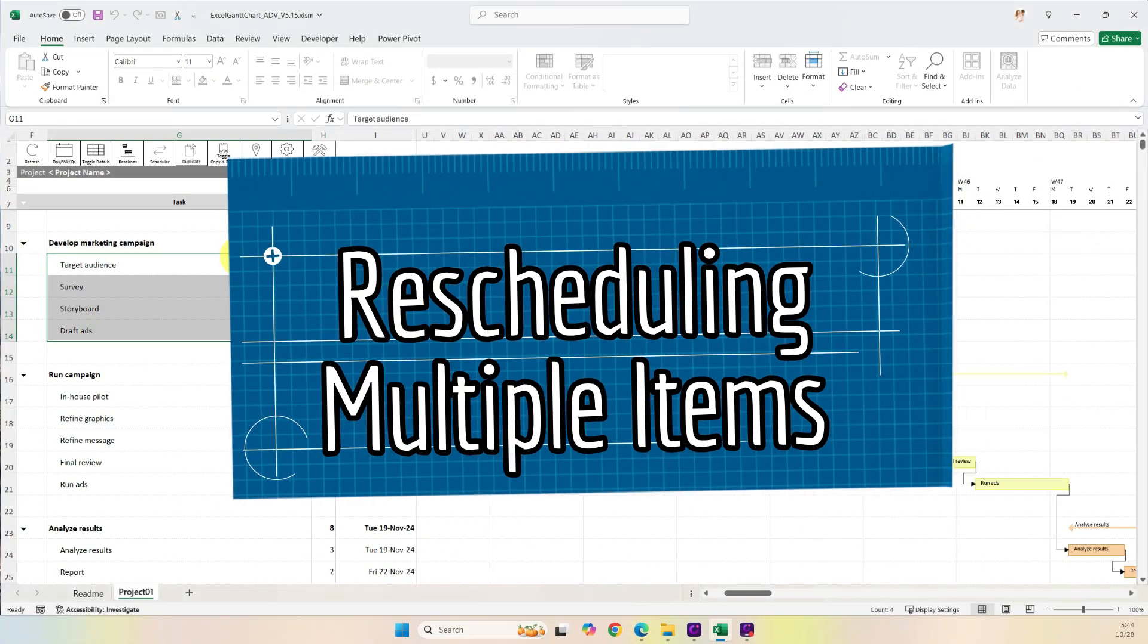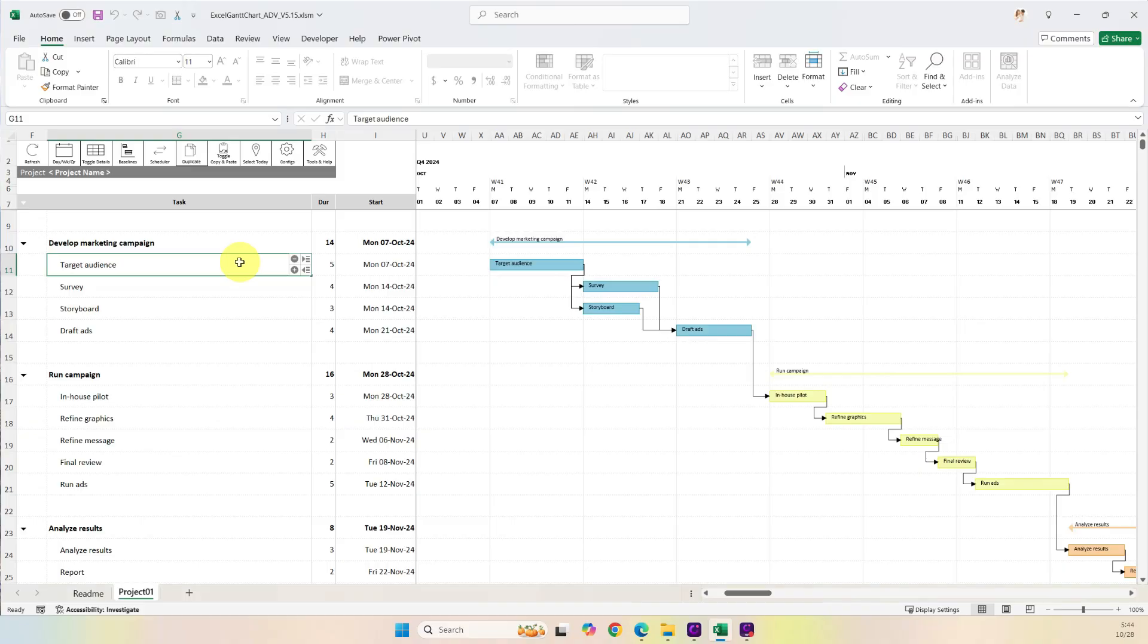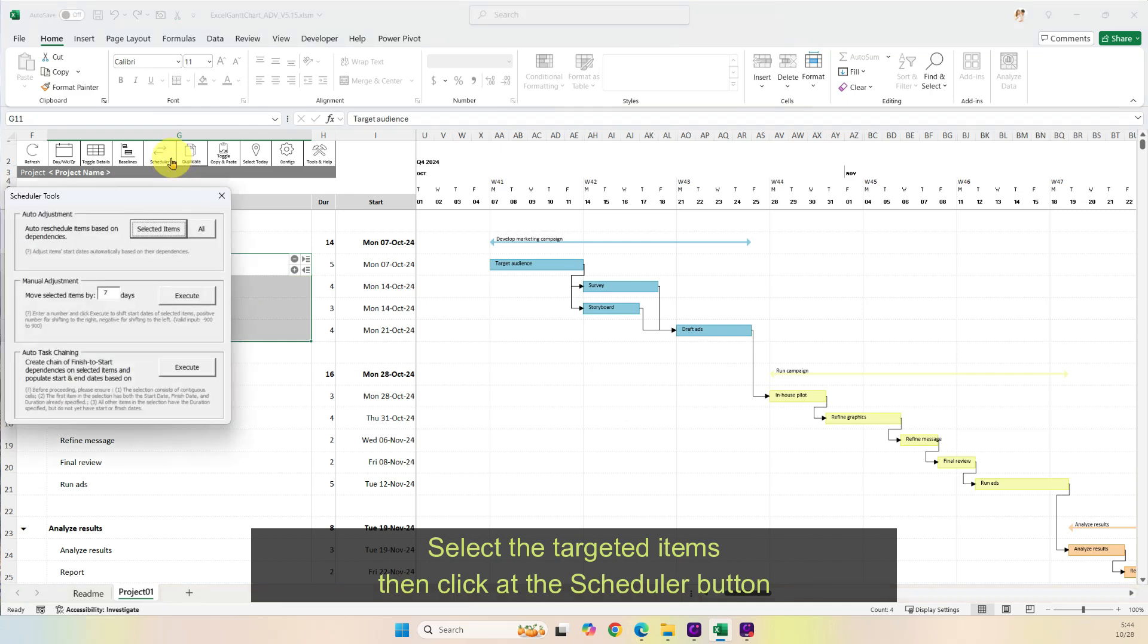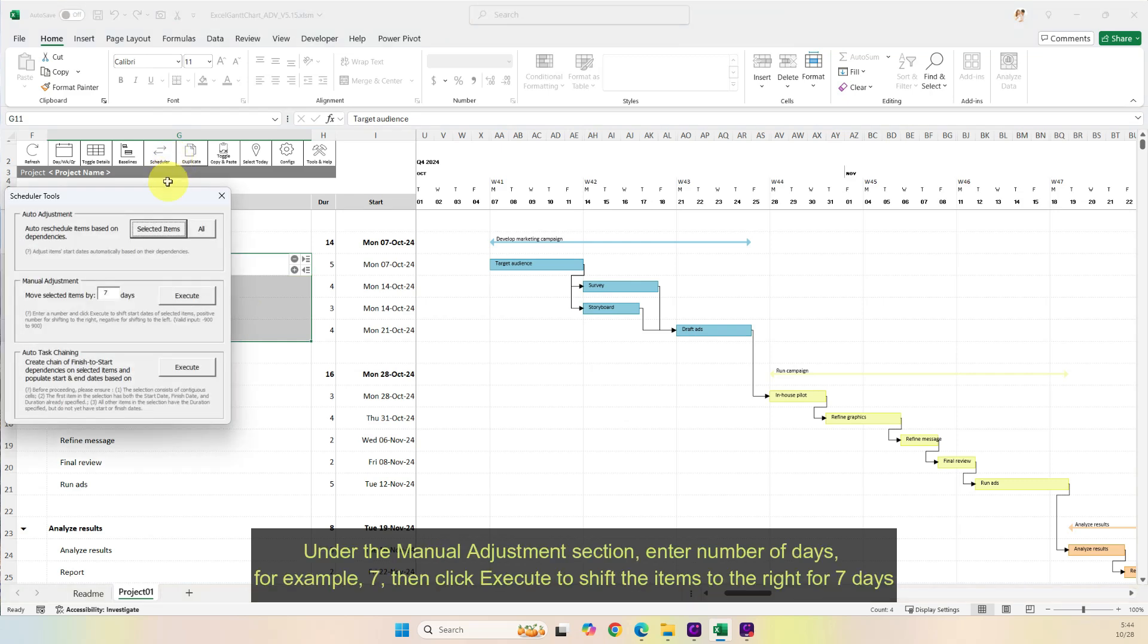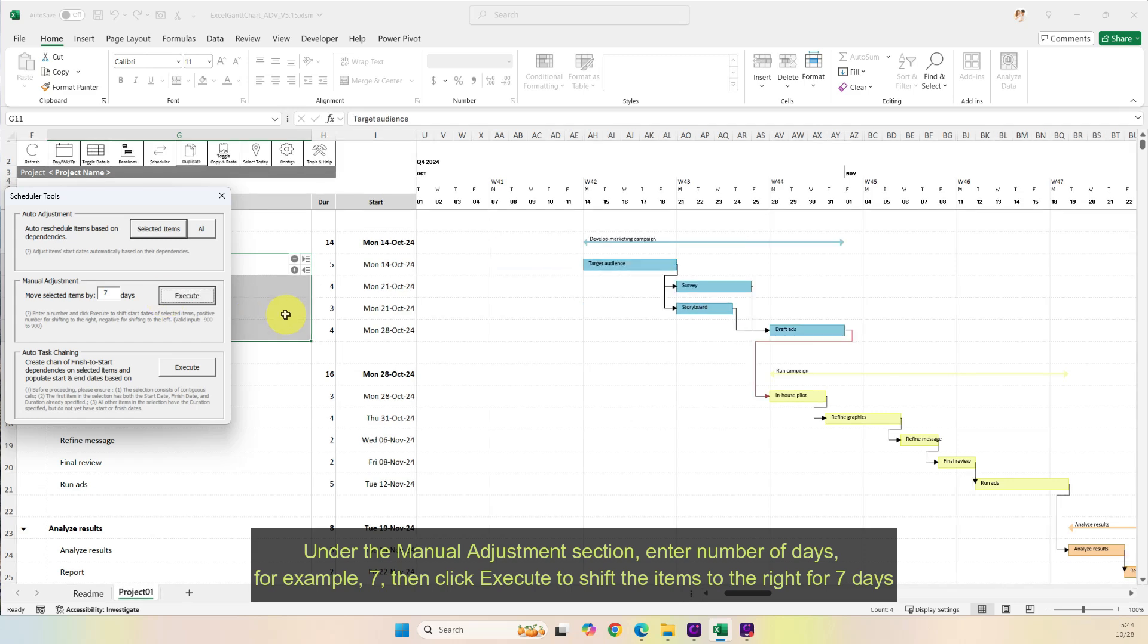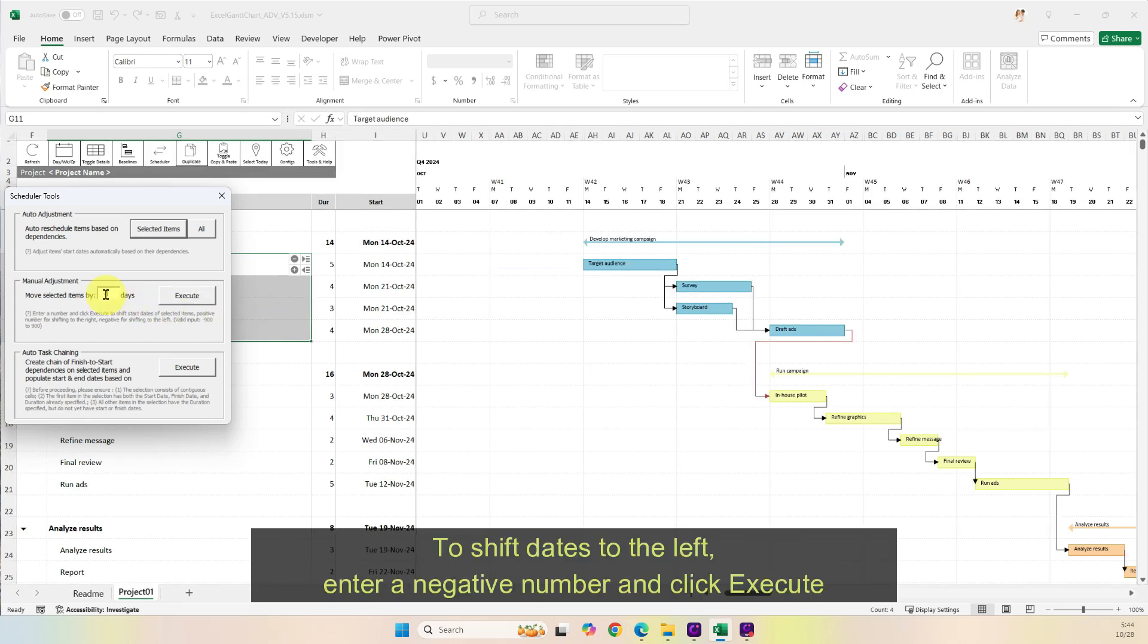Rescheduling multiple items. Select the targeted items, then click the scheduler button. Under the manual adjustment section, enter number of days, for example, seven, then click execute to shift the items to the right for seven days. To shift dates to the left, enter a negative number and click execute.